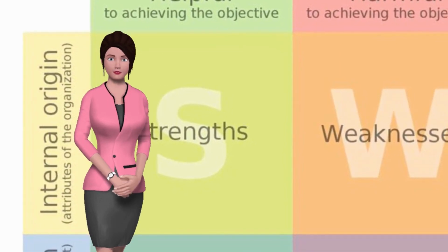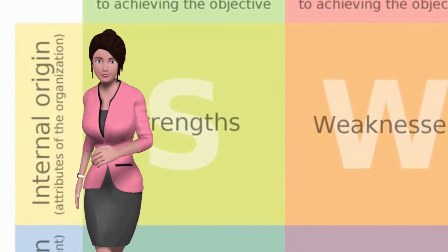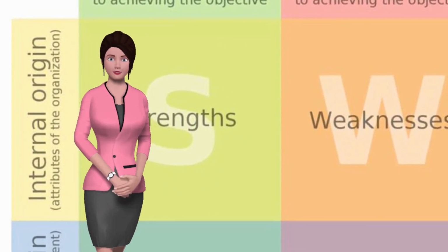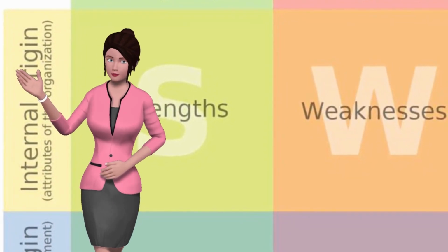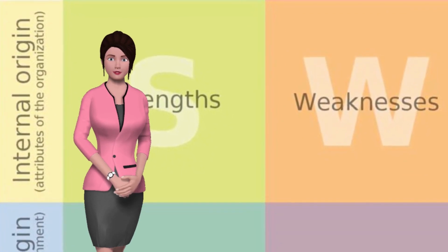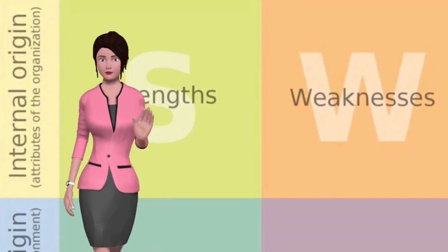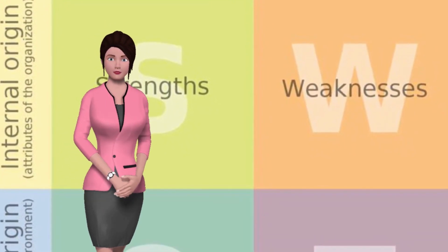When collecting SWOT, illustrate your findings in a 4-square grid. The top of the square has strengths to the left and weaknesses to the right. Below that is opportunities to the left and threats to the right. The left-hand side is helpful to achieving the objective of the project, and those on the right-hand side are harmful to achieving the objective of the project. This allows for analysis and cross-reference.